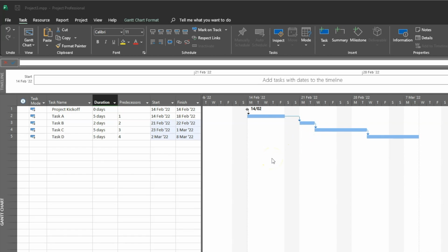A simple example may be, a piece of wood must have been sanded and cleaned, task A, before it can be painted, task B. The next type of predecessor relationship is start to start. A simple example may be applying icing to a cake. As the cake starts to cool, task A, you can start applying the sugar-based icing, task B.